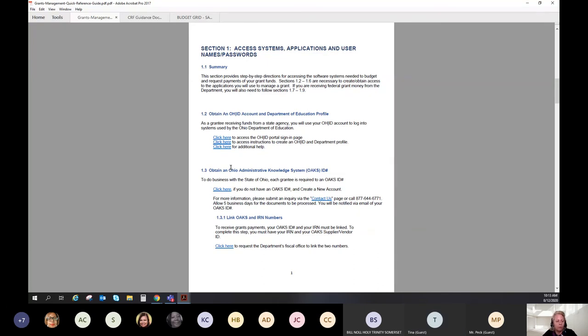If you have payroll every 2 weeks and would like to submit a cash request every 2 weeks, you can. The only caution with project cash requests: you can submit as many as you want, but it takes about 7 to 10 days for the entire process, and you cannot submit another cash request until the first one has been completely paid through the state accounting system. So it'd be best just to wait until the end? That's certainly up to you. We have all sorts of entities, and that is not something that we regulate or mandate. The only stipulation is that you will not be able to submit a second PCR until the first one is paid, and that process takes about 7 to 10 days. Thank you very much. You're welcome.